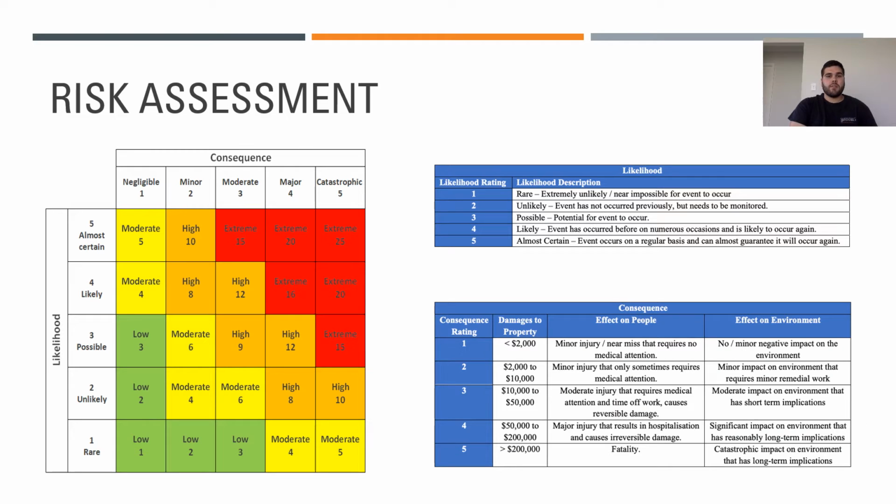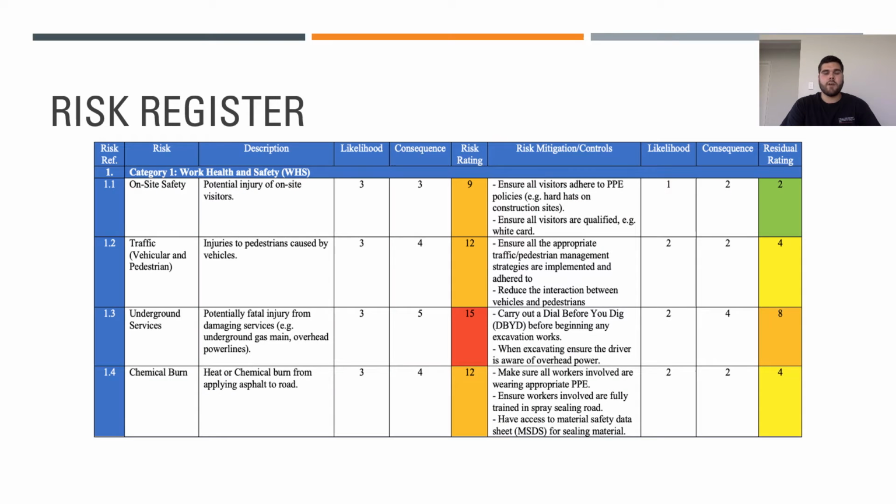Next, the identified risks were extensively analysed using a common risk severity matrix, otherwise referred to as a likelihood consequence matrix. This tool is effective for risk analysis as risk exposure is equal to the likelihood multiplied by the severity of the impact. Hence, it was adopted and used to quantify the potential project risk before and after mitigation controls were applied within a risk register. Finally, the detailed risk register is compiled from the procedures outlined and completed above.